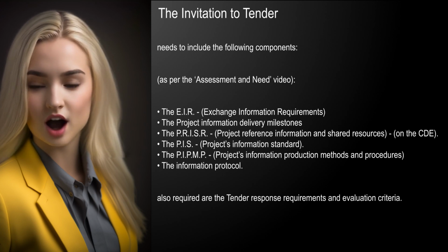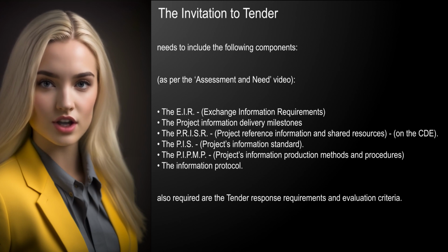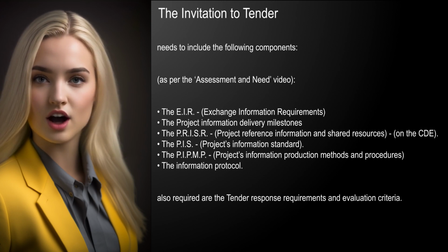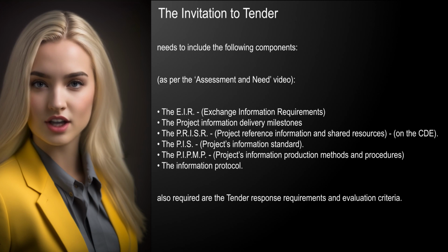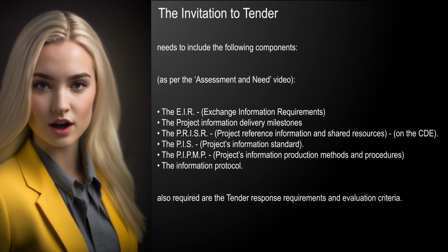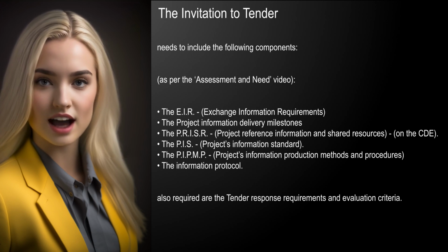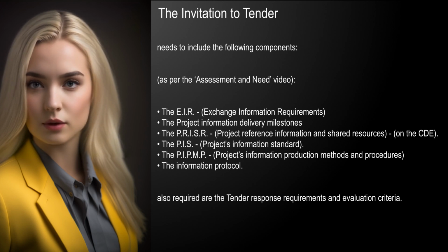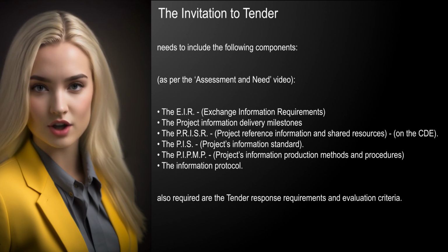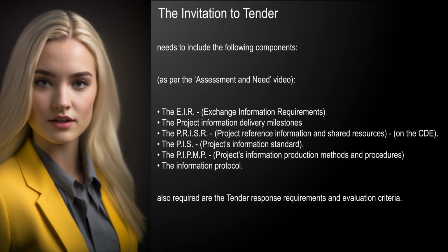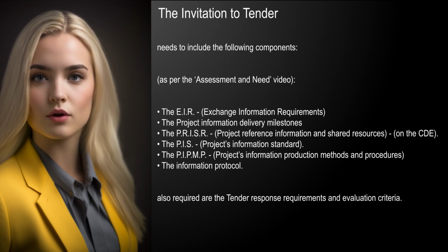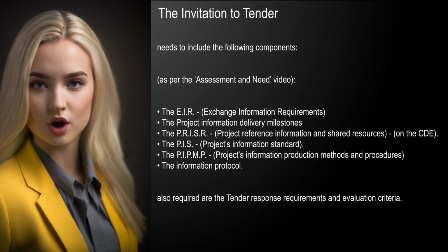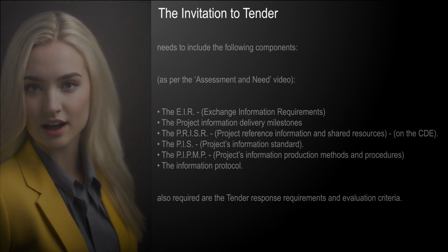Exchange Information Requirements; the Project Information Delivery Milestones; the PRISR, Project Reference Information and Shared Resources, on the CDE; the PIS, Project's Information Standard; the PIPMP, Project's Information Production Methods and Procedures; and the Information Protocol. Also required are the tender response requirements and evaluation criteria.